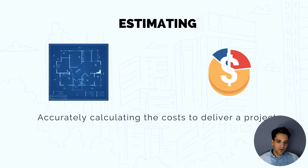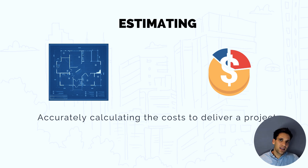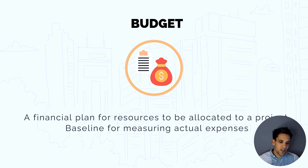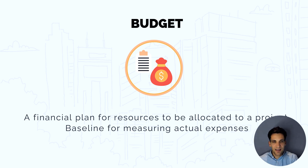Estimating is the process of accurately calculating the cost to complete the project. In the pre-delivery phase, we work out all the resources we need and how much they'll cost to arrive at a total estimated cost. Once we begin to spend money, we need a budget. A budget is a financial plan for the resources to be allocated during project delivery. An estimate is different to a budget: an estimate is a build-up of the cost, while a budget is how we're going to track and manage expenditure.